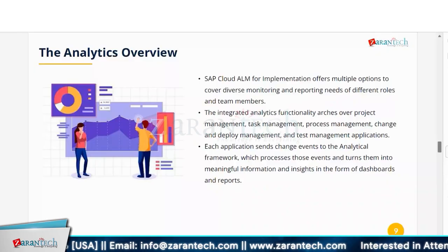A work stream lead would not be focused on deployment, but more on how the features are going during the release phase, because a feature will carry your transfer. So he or she would want to see it from a feature perspective: how many features there are for my work stream, maybe 28 features, how many are in realization, how many are in development, and what is in specification. That is probably what he or she would want to see.